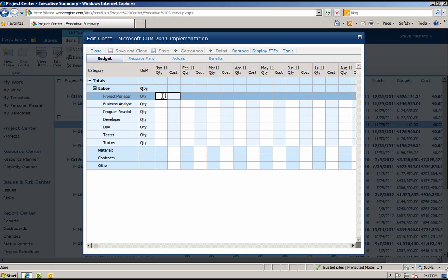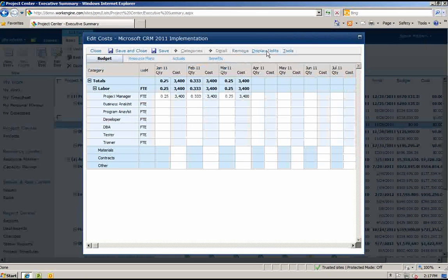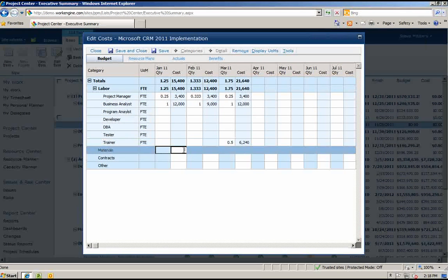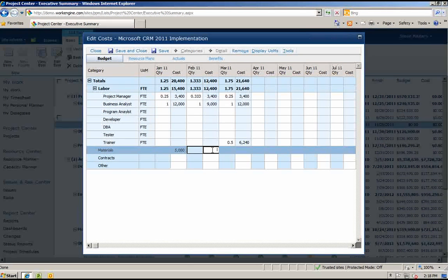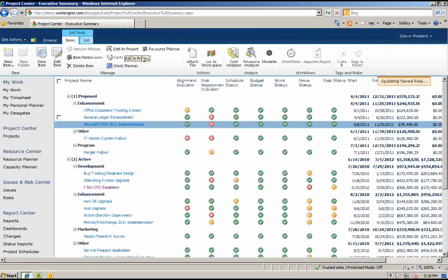Entering cost information is simple. You can either enter in hours for labor cost categories, which would show the total cost based on hours and rate. Or you can enter FTEs, which would take into consideration the number of days as well as the rates to give you your overall costs. You can also just enter a flat cost amount in the field for material or any other cost category that does not require calculations, such as hardware, software, etc. Once we are done editing our cost plan, we can save the plan.